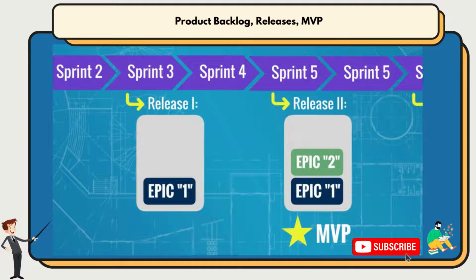The definition of the MVP is a key moment, as it sets a clear target for the project, defining the features without which the product cannot be used in any way. With an MVP in place, the organization can start benefiting from the project work and in the meantime collect feedback from early adopters for the following releases, which are still to be done.